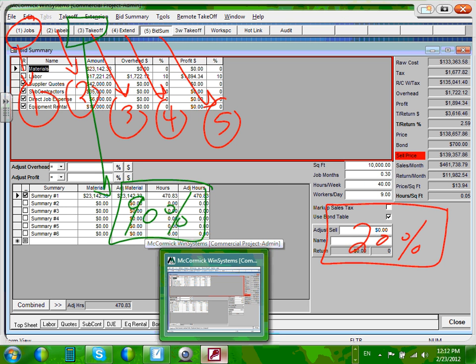Or you can take a PDF file of that drawing, or a CAD file, and do the takeoff directly on the screen. You draw the lines, and as you draw on the screen, it will register the type of assembly that you're doing. So there's a lot. The buzz right now is on-screen takeoff, as they call it, and CAD takeoff. That's the buzz. I know a lot of companies are doing it, but to understand on-screen takeoff, you have to understand the basics of the software. Accubid as well as McCormick will allow you to do on-screen as well as CAD takeoff.